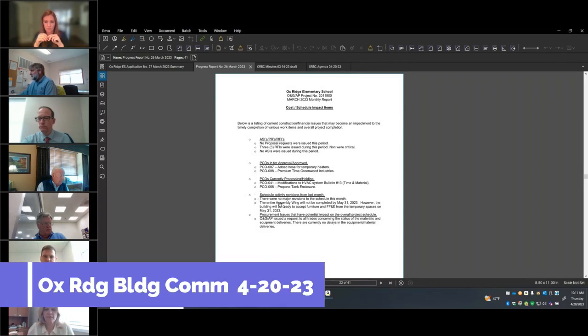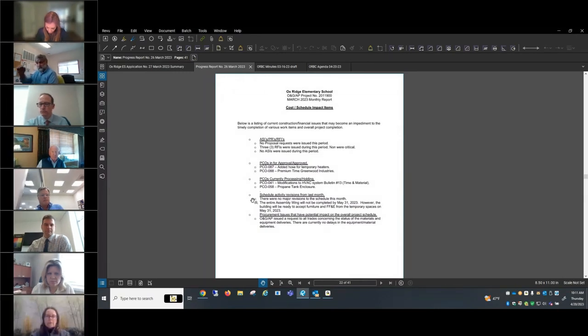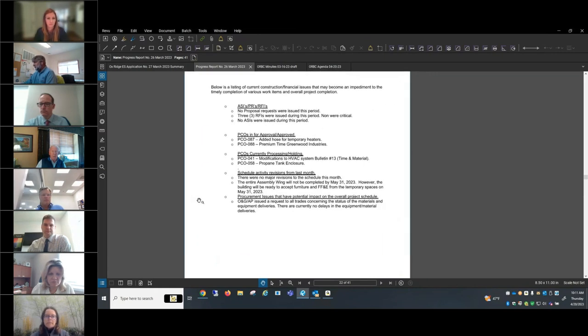Schedule revisions, no major schedule revisions. We did put a note, assembly wing will be completed by May 31st, but we'll be ready to accept furniture by then. I think we've since coordinated with the furniture consultant, and we're going to probably start moving furniture in around the first or second week of June. So we're just verifying that with her.